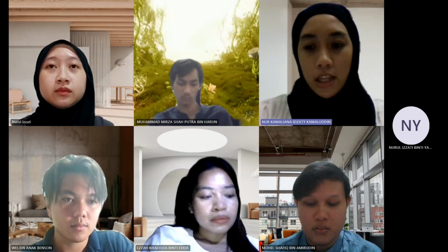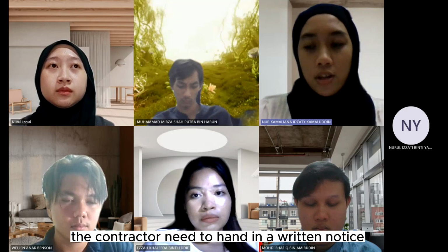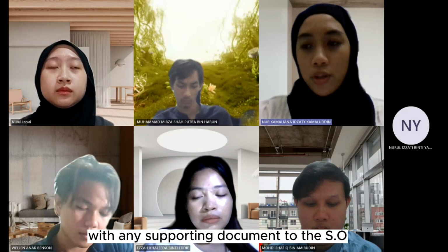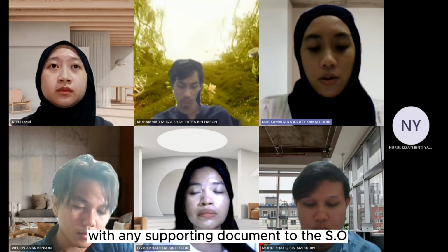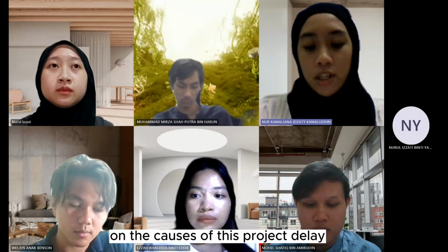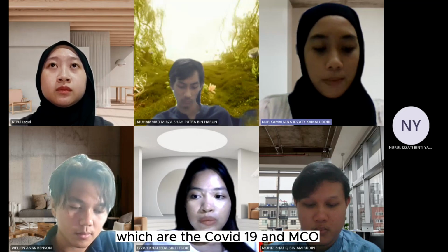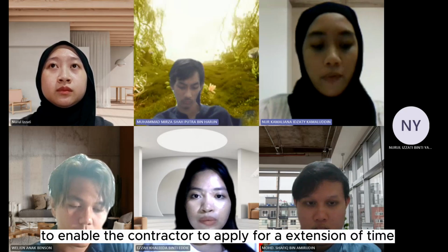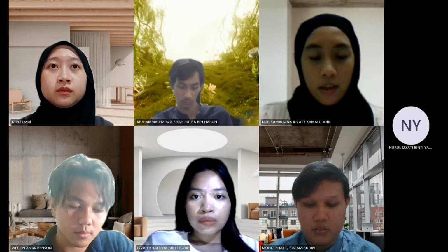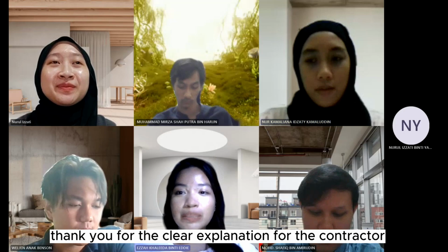So basically, the contractor needs to hand in a written notice with any supporting document to the SO on the causes of this project delay, which are COVID-19 and MCO, to enable the contractor to apply for extension of time. Thank you for the clear explanation.